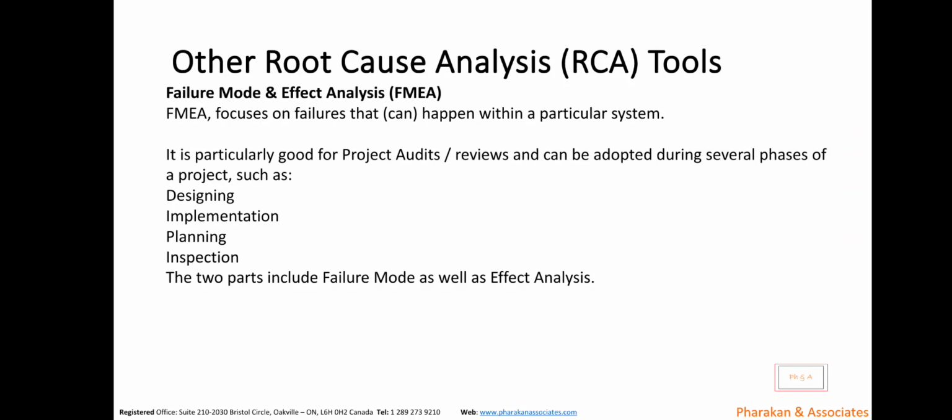Another tool that is very useful for root cause analysis is failure mode and effect analysis. I recommend this particularly for people who do a lot of project audits, particularly as organizations are embarking on the digitization journey of their businesses and operations. The failure mode and effect analysis simply says, take a look at the project life cycle and think through at what point along that life cycle there are potentials for failure. Identify those failure points and take a look further and say, what is the possible effect of a failure if it occurred at each of those failure points?